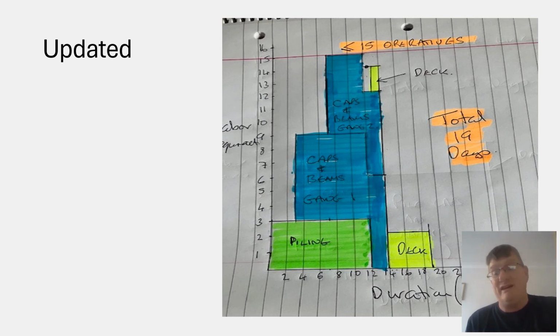So I could have reduced it to 18 days. It's actually taken me 19 days. So I've reduced my time now by 9 days. The operations now are much more efficient. Therefore, I'm going to be saving myself money because productivity is going to be much higher.